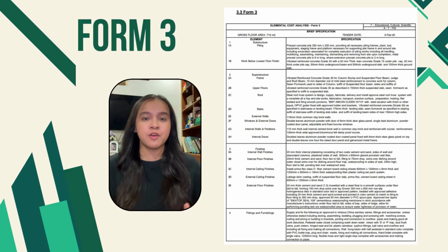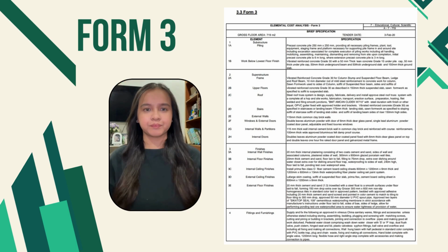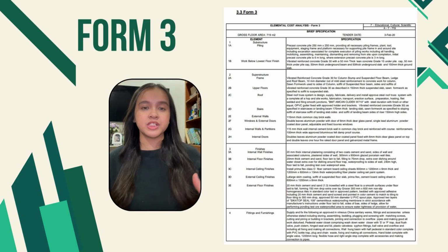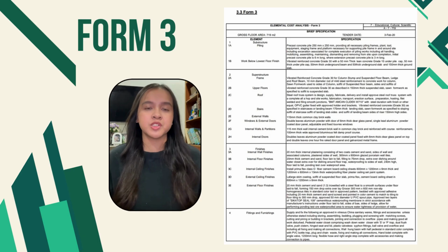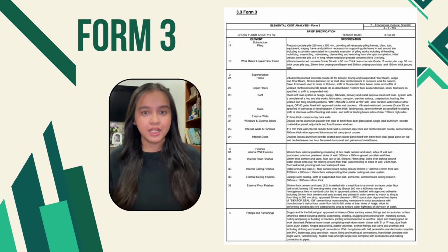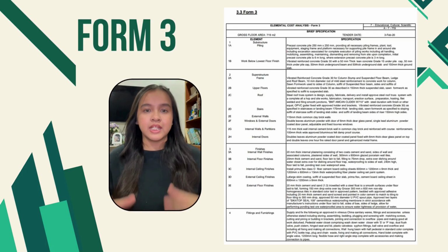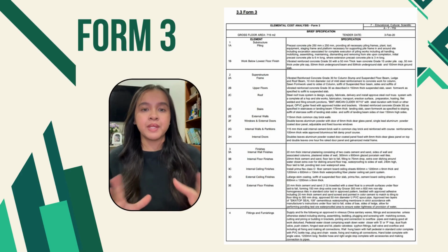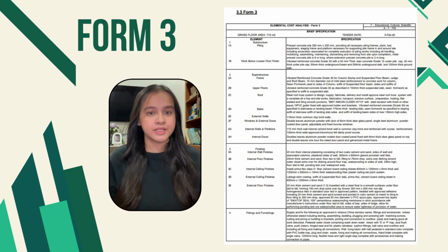The ECF form breaks down the project cost into 6 elements that match exactly with the scope of our project. First, the substructure and superstructure cover all structural work including piling, foundation, reinforced concrete frame, floor, roof, wall and stairs. These are necessary to create the main building framework for the classroom, dormitory and other blocks.